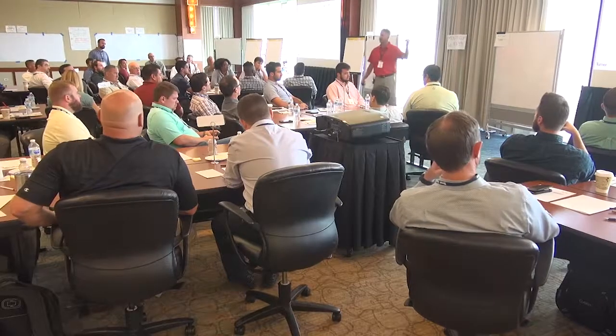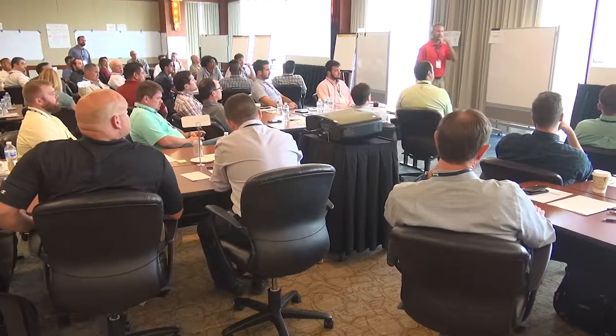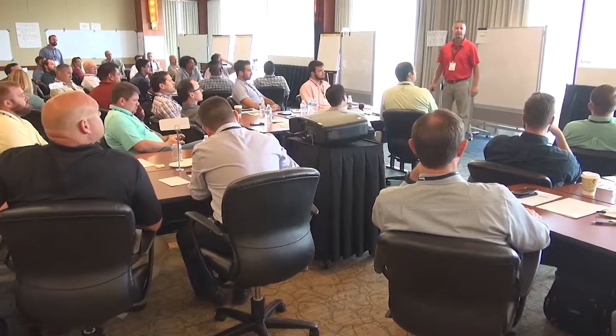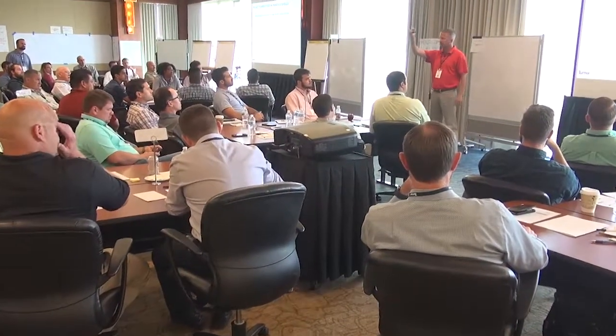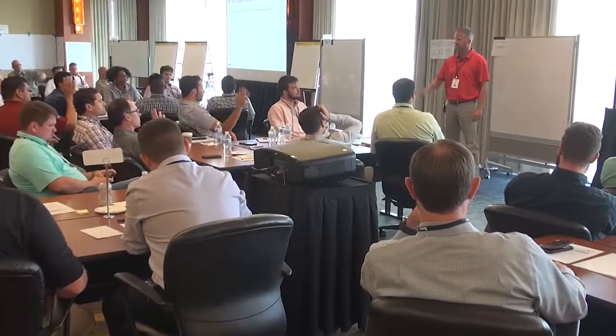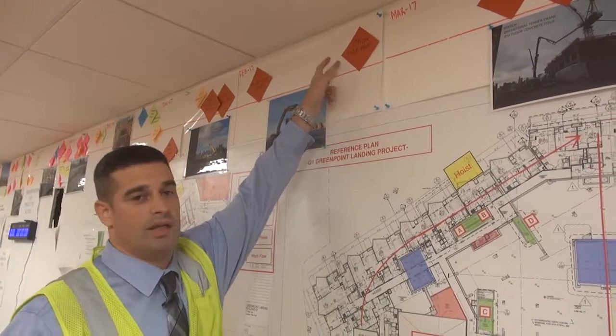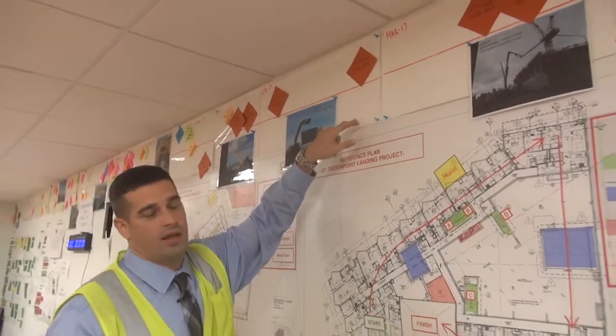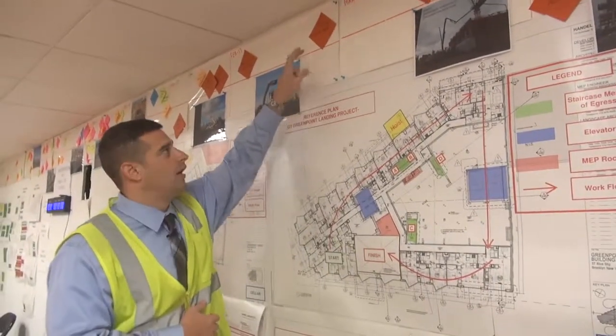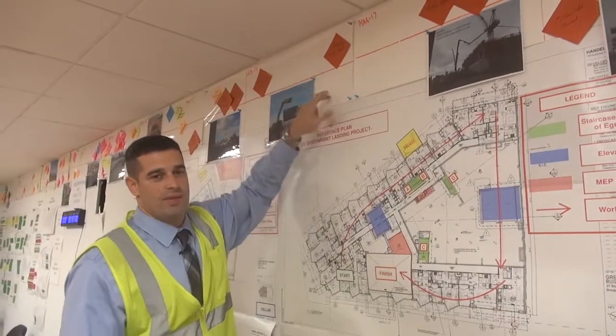So on this first one, what does that look like? When you hear visual management, how many of you have a milestone strip chart on your projects? This is, let's call it, the estimated portion of construction, what we need to meet. The bottom portion of the line is what's actual, and you're constantly measuring estimated versus actual.